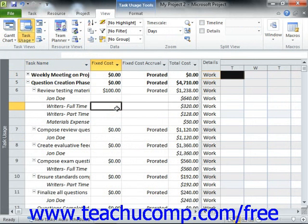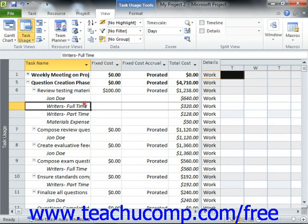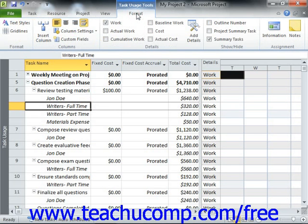Now you will want to select the assigned work resource whose cost rate table you want to change for the desired task within the project file. Once you have the name of the assigned resource within the desired task selected, click the Information button that appears in the Assignment group on the Task Usage Tools contextual tab within the ribbon.